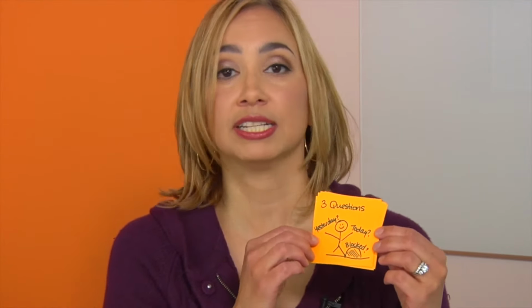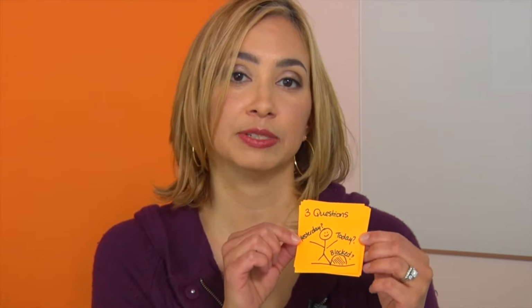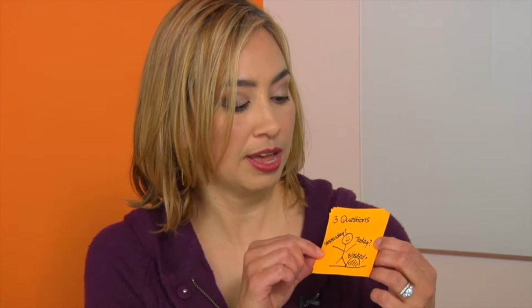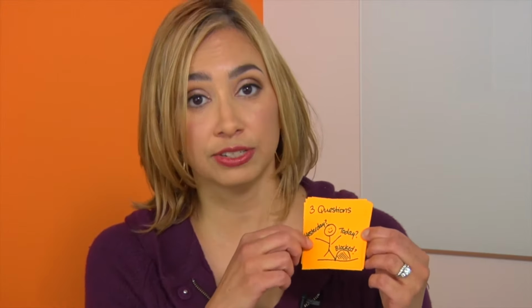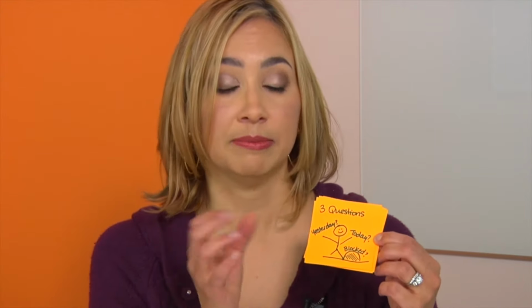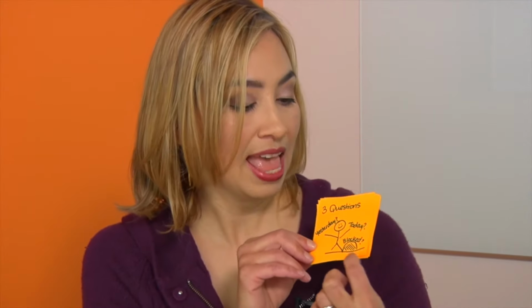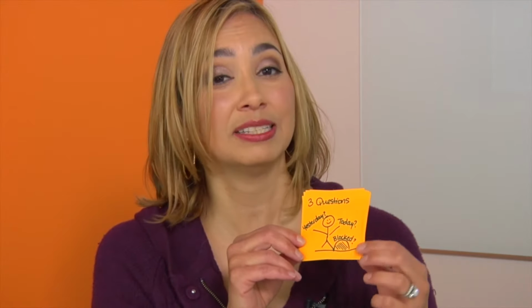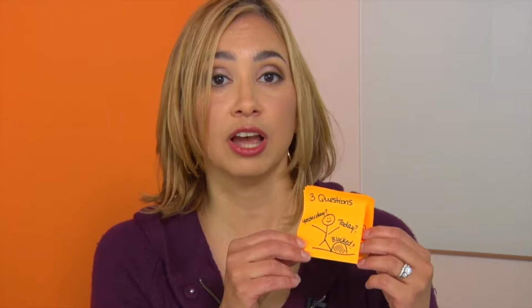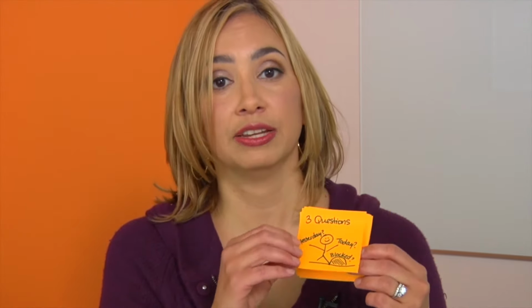In the daily Scrum, this happens every day. It could happen in the morning, doesn't necessarily have to, but this is a quick meeting, no more than about 15 minutes with the development team to talk with one another, sync up, and answer these 3 questions. What did I do yesterday to help the development team as a whole? What am I going to do today to help the development team as a whole? And where am I blocked?